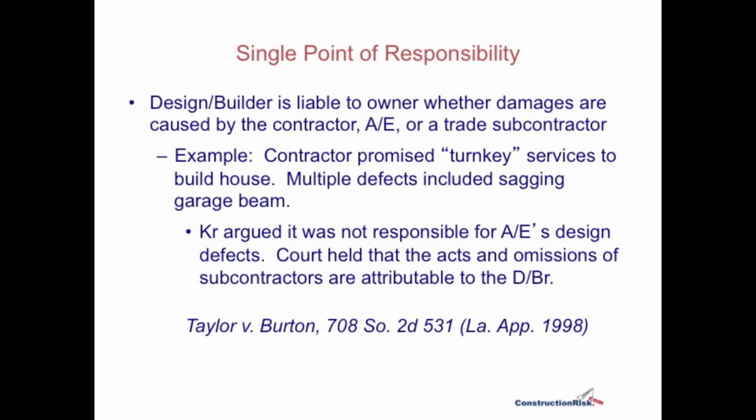So the design builder is liable to the owner, whether the damages are caused by the contractor, the designer, or a trade sub. An example is where a contractor promised a turnkey service that would build a house. There were multiple defects, and these defects included sagging garage beams.